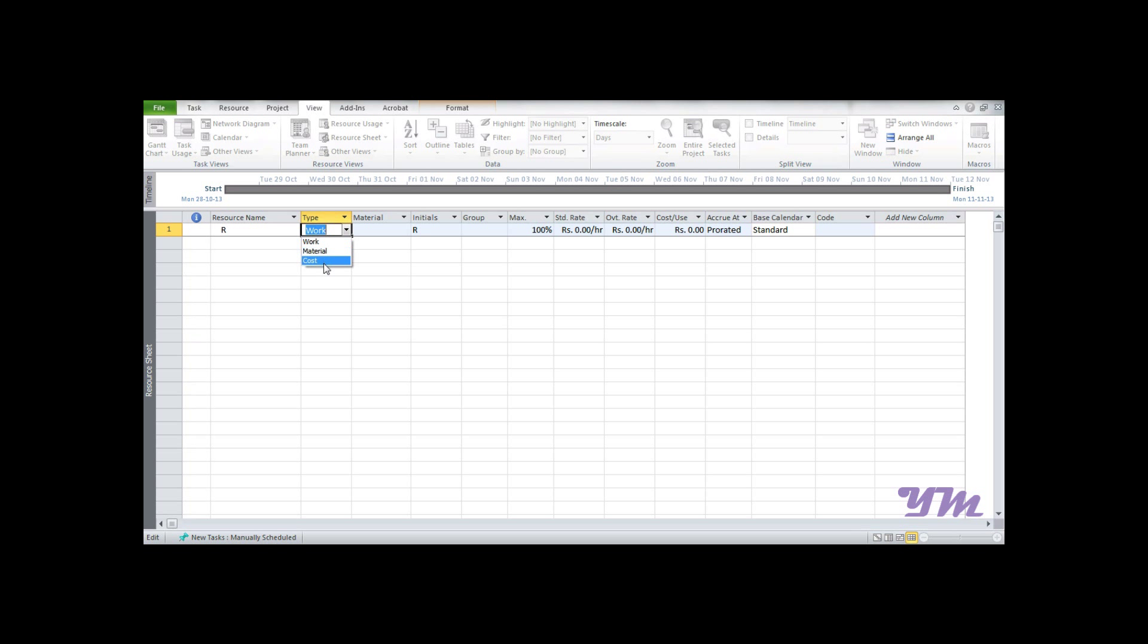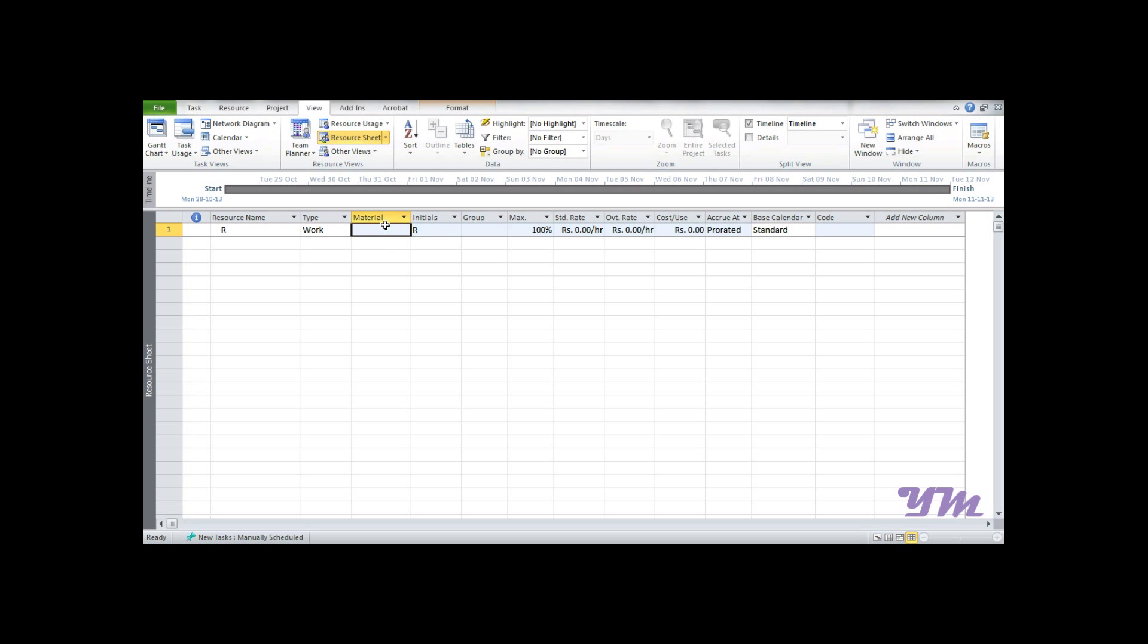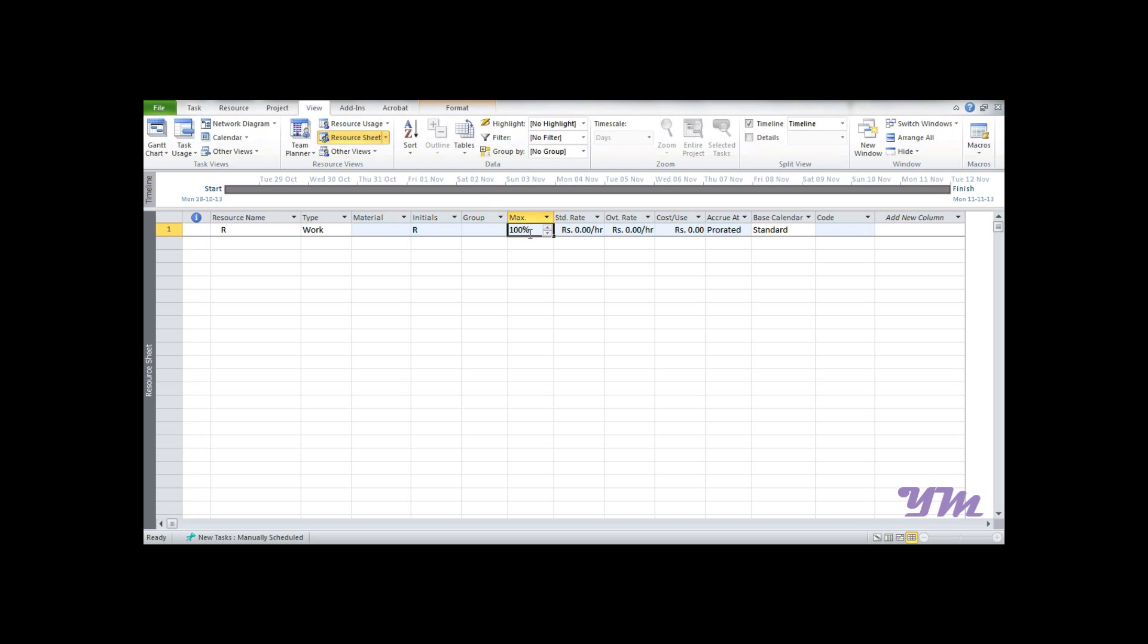Let's assume this is manpower, so it's considered work. If it's material, you can write the detail description in this tab. For initials, you can initialize it in whatever form you want - R1, R2, or just R. Maximum units means how much maximum number of resource R we have. It's denoted in percentage, but it would be better to denote this in decimal values.